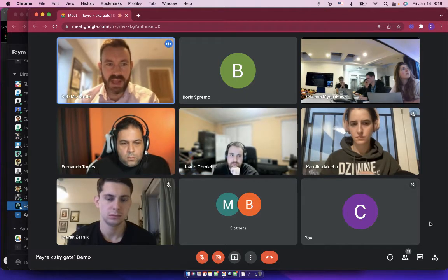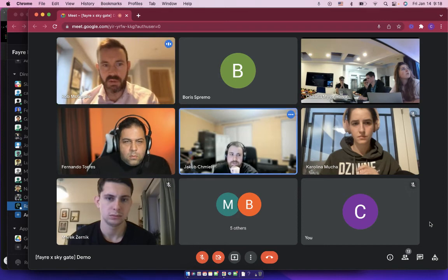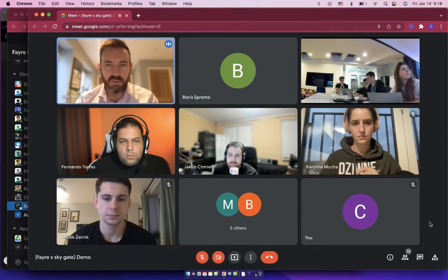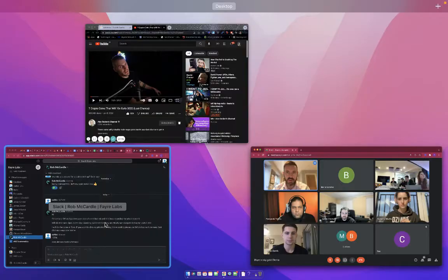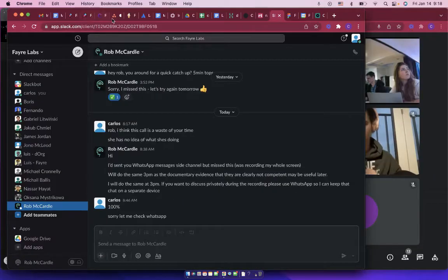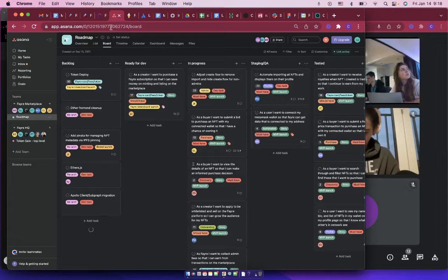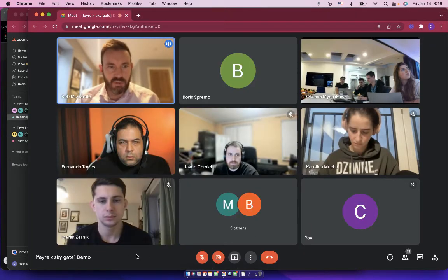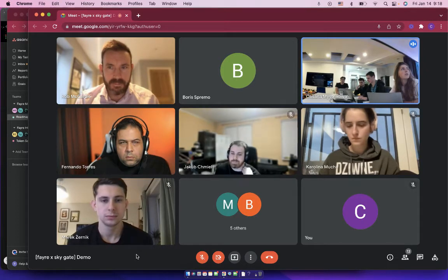Yeah, we'll give them a category of bug, and if you can collate them or relate them your end, I think that makes more sense. So we'll just put them in there and assign them to you, Oksana, because I think you need to do that work to schedule them to the right people. Sure. Once you have the bugs and the priorities, then just feel free to assign it to me.